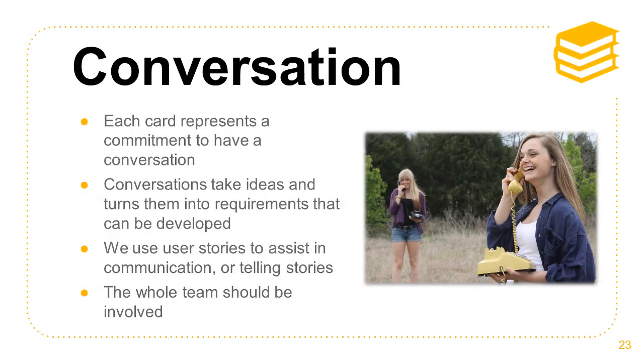The second C in the 3 C's stands for conversation. The existence of a user story represents a commitment by the team to discuss the user need and to work to uncover how best to deliver the business benefit anticipated. The user story is not a specification for something that must be built, but is a statement that there is a need that should be met. Conversation turns the placeholder into something that can be delivered.